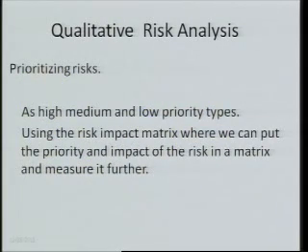Further to which, what is exactly done in the planning phase? We look into the planning phase about what team size we need for the process of risk management, how they are going to work with this particular process, and what methodology and technology they need to manage risks. This whole pre-work is done in the planning phase. Planning phase is done, identification is done.